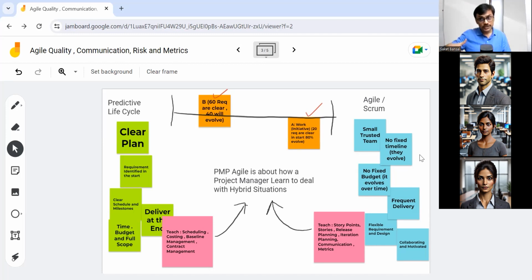But when you are executing, if we make a sequential process, I may not even come to know if we are going on the right track till 6 months pass by. So even if we are developing 100 features, the 100 features are fixed, but I want to develop 20, so that at least I am very sure that 20 are working and we are integrating and mitigating our risk. But if after working on 20, somebody says, no, change 5 of those 20, I will say, guys, I'm not going to change. You see the document, we already had an agreement.